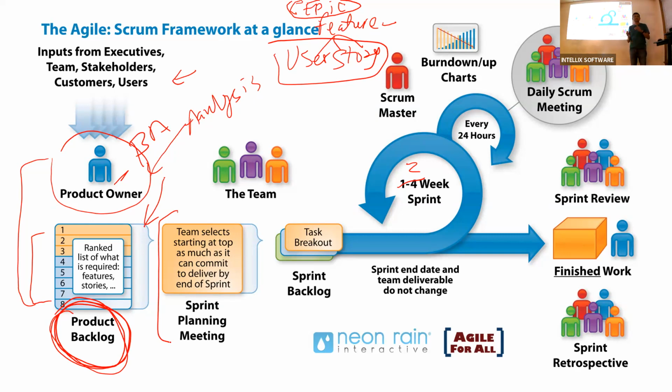You are doing design, you are doing development, you are doing testing, UAT, and delivery to the production within 2 weeks. So on Monday mornings, I'm telling you what actually we do in the Agile sprint at work. Monday morning, all the team members gather, they look at the product backlog items, basically, and they look at what can we deliver over the next 2 weeks? So they will say, let's pick manage users and manage lender, 2 modules. We can deliver only such capabilities for those 2.